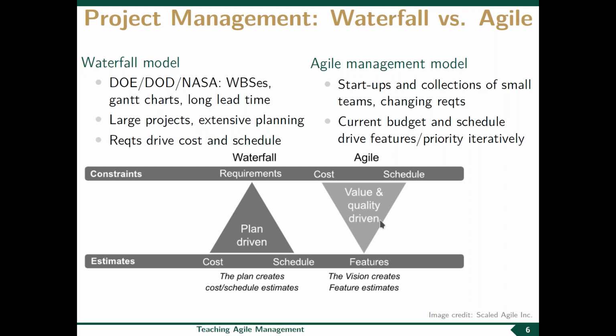Agile management takes a different approach. Instead of letting the requirements drive cost and schedule, we let the current available budget and the current schedule drive what features we want to implement first. This is more frequently used by startups and small teams in organizations such as NASA and Amazon, and it is in the title of the talk. The reason is that there are often changes in these requirements that have to be implemented in the product, and the waterfall approach does not really allow for that very easily.